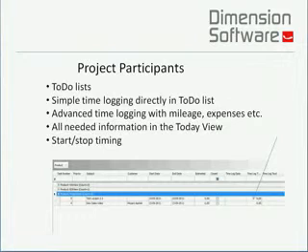A very, very important feature again is that when you, as a project participant, log your time, this information is fed back into the project management side of things. Say, for instance, we have a task which is estimated for 10 hours. Now you've spent 5 hours, but you've only done a quarter of the task. So we can anticipate this task will go over time. We will spend more time doing this task than we thought initially. This is very, very important information. This is automatically being fed back into the project management side of things.